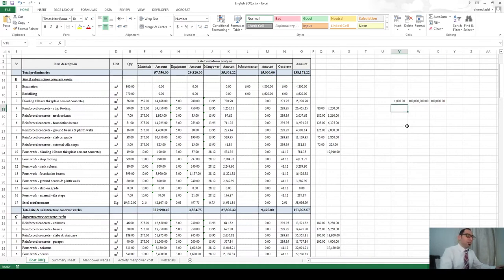So what if I have a new hotel that has 1,500 rooms? 1,500 rooms times the room price, so the new project will be about 150 million. This is called the end unit method, and this is a conceptual method. This is not a definitive or a deterministic method. It is not accurate, guys. It is just an understanding, okay, it will come up somewhere around this, maybe 50% more, maybe 50% less.